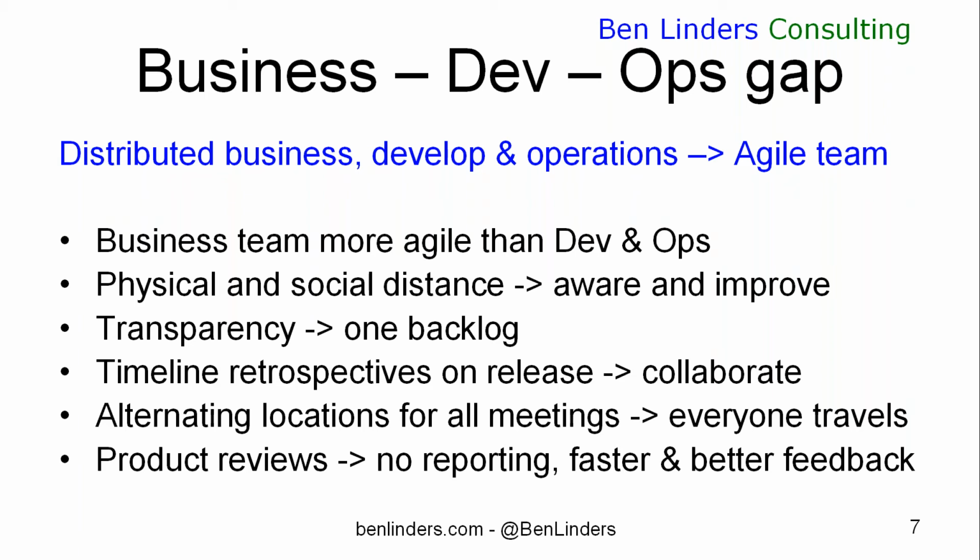One of the other things that helped us to bridge the gap between development and operation was a timeline retrospective that we did on a product release. We did a very detailed timeline retrospective, a total period of about 6 hours, preparing for this release, putting the actual release to work, looking at how the release was working out with the operation people, looking at the people who were using the system, seeing if there were any problems or not, deciding on whether or not a rollback was needed.